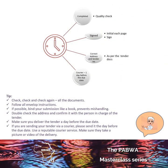Your tender needs to be completed and signed. You must be sure about the correct address and the tender number. The guys who put tenders out are very explicit about how the tender needs to be delivered. Sometimes there is a two-envelope process where you put your cost in one envelope and your proposal with technical specifications and compliance documents in another. Sometimes there's a three-envelope system with compliance documents, technical specifications, and cost separately. Sometimes it's one document. You need to read that document and be 100% sure how you need to deliver this.